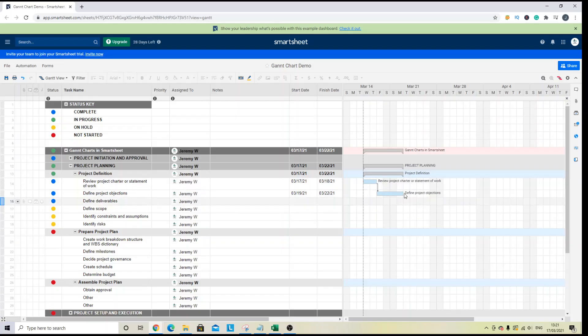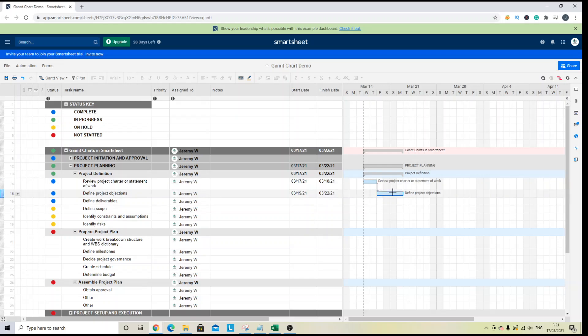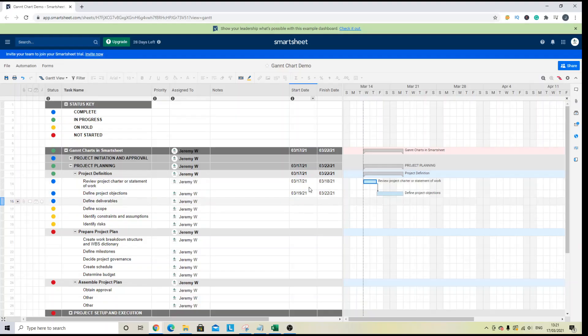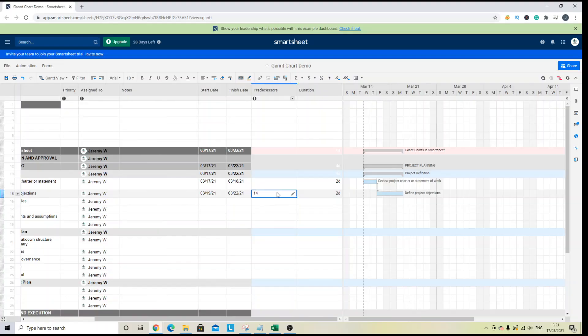And what that's going to do is that's going to set up a dependency. And if you noticed these dates updated accordingly. So if I want to take that off, you need to remove the predecessor.